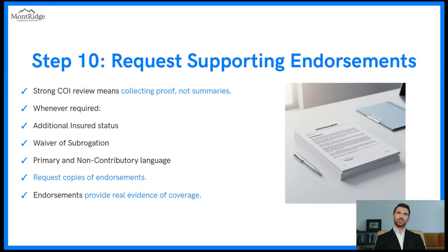Step 10. Request supporting endorsements. Strong COI review means collecting proof, not summaries. Whenever required: additional insured status, waiver of subrogation, primary and non-contributory language. Request copies of endorsements. Endorsements provide real evidence of coverage.